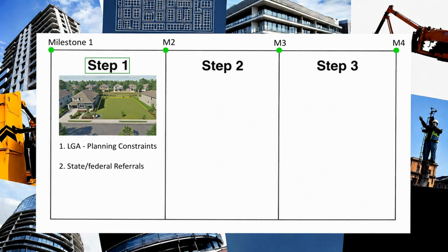So we download the relevant state development assessment provision, commonly known as SDAP, that has been triggered. For example, SDAP 6, Protection of State Transport Networks. Ensure you have demonstrated compliance with the performance outcomes with this particular provision and adjust your concept design accordingly or prepare a reasonable argument for not complying.